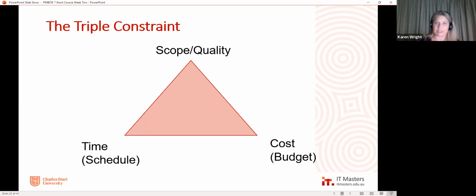So once we've got a business case confirmed, we've really got to work on creating a scope management plan and say, if this is the scope of the project and if you want to change it, what will that process look like? Well, we'll do a change request and submit it to the sponsor, and the sponsor will either approve it or reject it. Okay, perfect. We then go and gather some quality requirements. So this is a matter of talking to our stakeholders and working out what it is they want the project to be able to do, or the product to be able to do and deliver. And then we try and align that as best we can with a schedule and a budget.